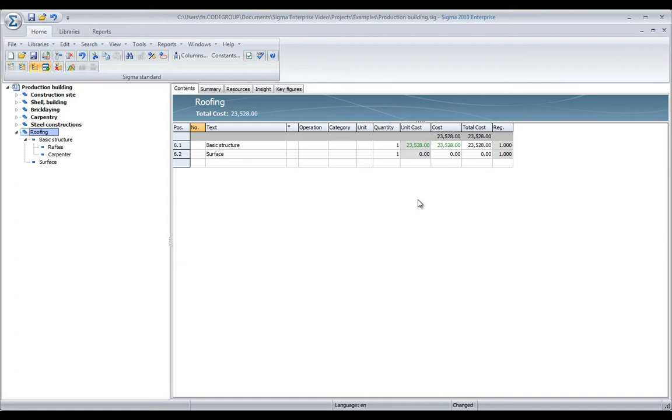The program always knows that the quantity times the unit cost is actually what makes up the price. Basically, this is all you need to know to create your own projects in Sigma. You will learn how to speed up and add quality by using libraries, but you can always fall back and just use the basic features of Sigma.